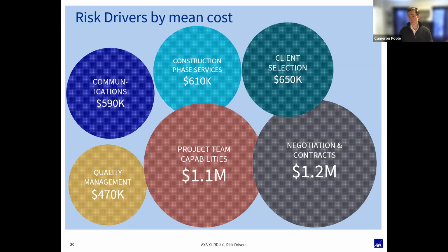There's a big exposure in the residential world too, though. You know, if it's rental units, what's the loss of rental income? If it's condo units, they've seen the argument where, hey, now the market has gone down X% and you're on the hook for the delta because there were delays and we couldn't get these on the market when we wanted to.